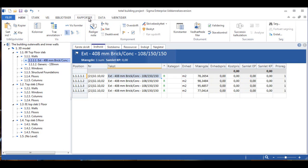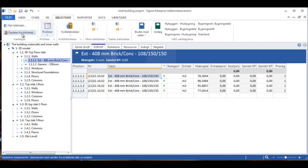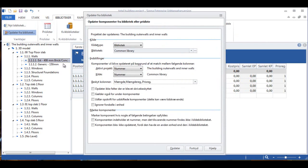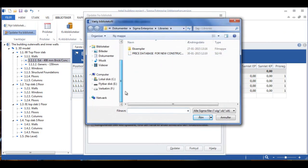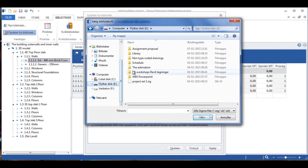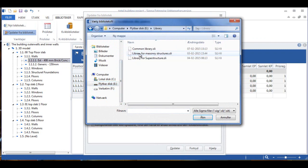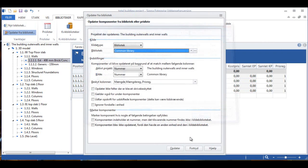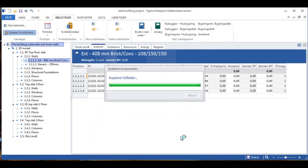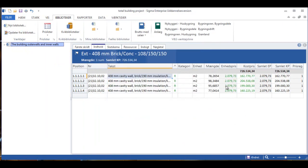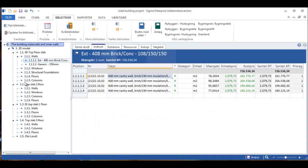And again these are just measured up in quantity from the model but the price is not coming. So again it's a question of going in to Libraries and updating from the library. And we used NRM2 as a basis for type coding so we find the library there and we updated from that library to get the prices.